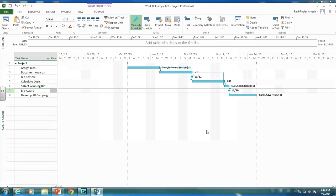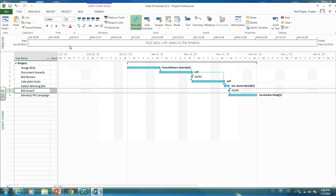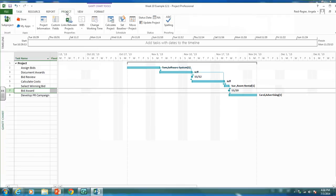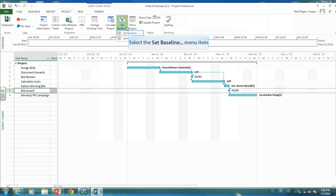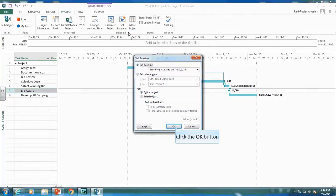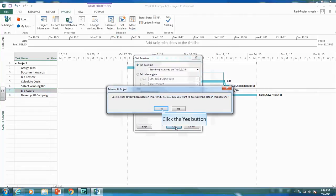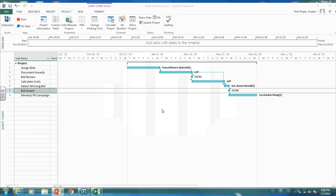Now that we've added these new items, we should re-baseline the project. Once the project has started you should never reset the baseline, but our project hasn't started yet — we've just added some new activities before it begins. So we re-baseline, taking a fresh picture of what our planned schedule is.